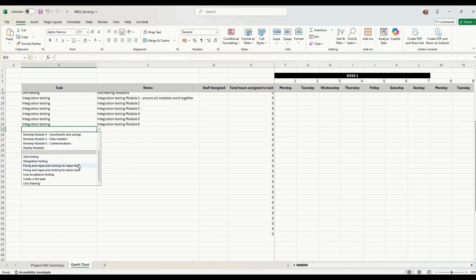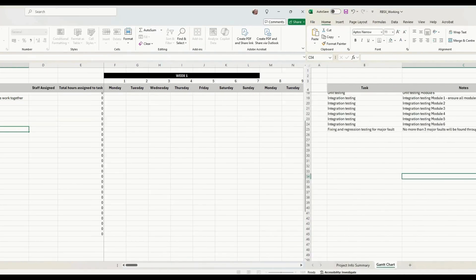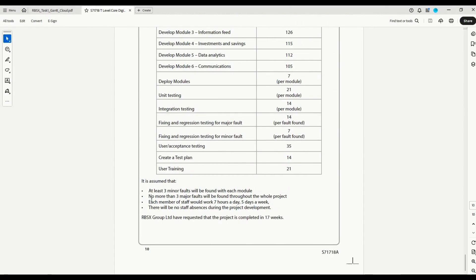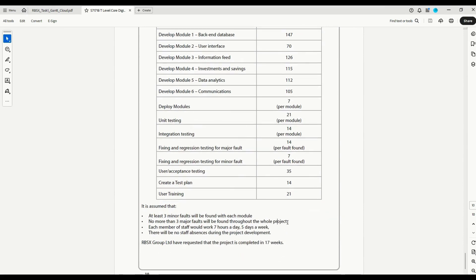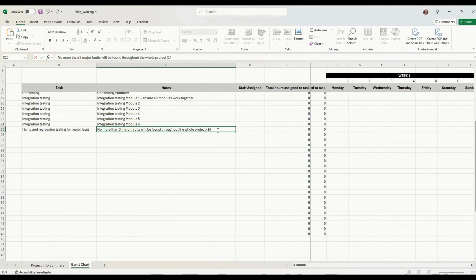Our next task is fixing and regression testing for major faults. The set task brief states no more than three major faults will be found throughout the whole project. We need to work out how long that will take: fixing and regression testing is 14 hours per fault found. So 14 times 3 equals 42 hours. In total, fixing and regression testing for major faults will take 42 hours.